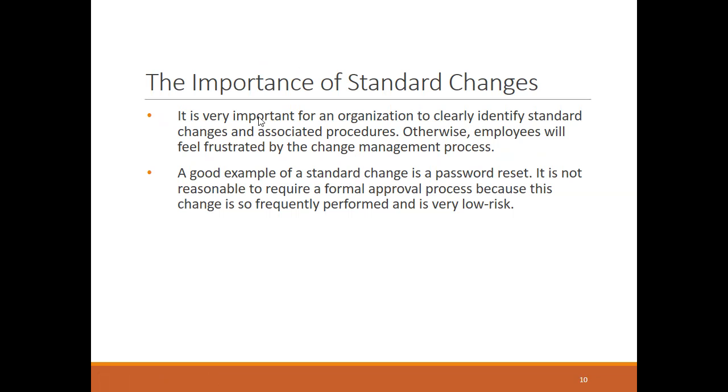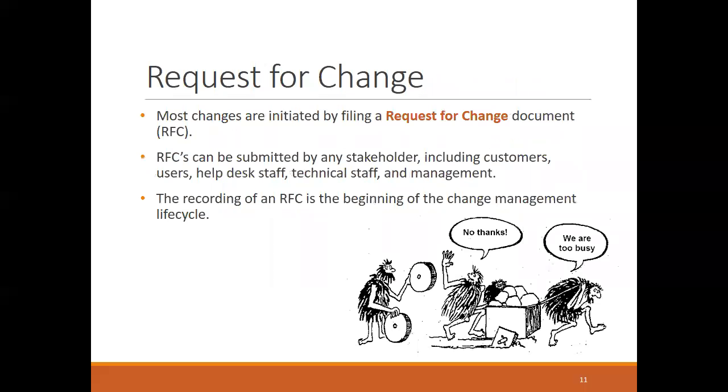So with a standard change, I hope that's clear. These things happen. We've already written them into a sort of manual. This is how we do a password. And so if somebody comes with a password request, our people on the service desk can just do it. They don't need to ask anybody. Boom, boom. It has a low risk, and we just do it.